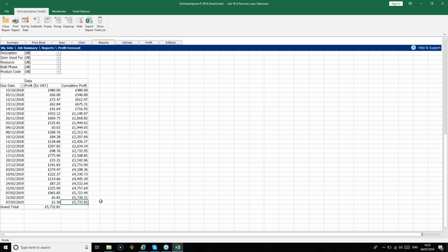If your customer asks you to knock off 10% of the price, that would be £5,000. In other words, all of your net profit would be gone. However, if the customer asks for a 5% discount, then that would be just over £2,500, leaving you with around £2,500 of net profit. So by going into that negotiating situation, knowing what your net profit would be for the job, you'll be much better informed about your break-even figure, and you'll be far less likely to agree a price that could lead to a loss.